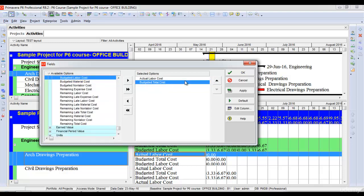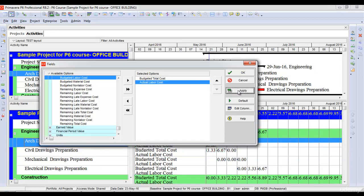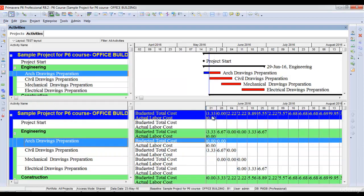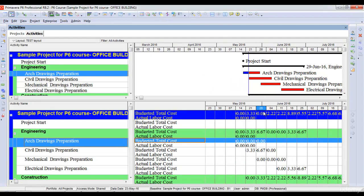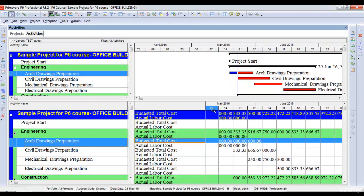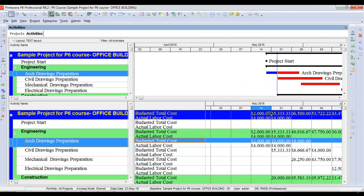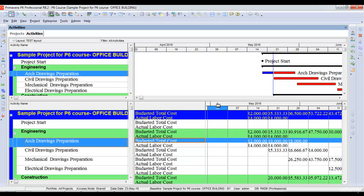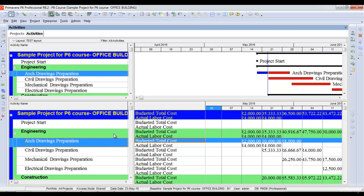and actual total cost of my project. Once I pull out these two columns, you can see here now it shows me the budgeted total cost of my project. It shows me the monthly breakdown of budgeted total cost of my project as well as the actual total cost of my project in the form of a spreadsheet.